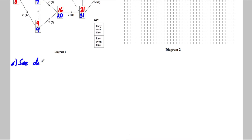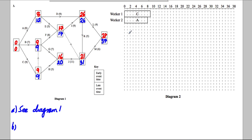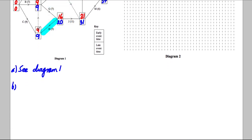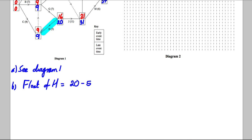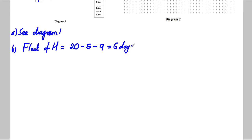For part B, calculate the total float for activity H. Activity H can start at 9, is 5 days long, so could finish at 14, but doesn't have to end until 20. Total float = late event time − duration − early event time = 20 − 5 − 9 = 6 days.